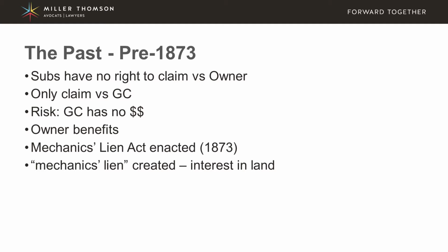So going back to what I was saying, the only claim that the subcontractor would have was against a general contractor. That created risk for the subcontractor because the general contractor may not have much money, and they certainly probably wouldn't have as much money as the owner. So the owner would benefit from the blood, sweat, and tears of the subcontractor, but the subcontractor would have no recourse against the owner. This was, as you can imagine, problematic from the subcontractor's perspective.